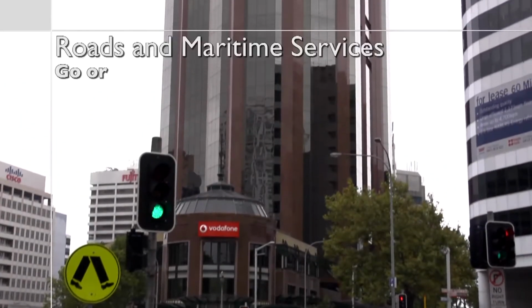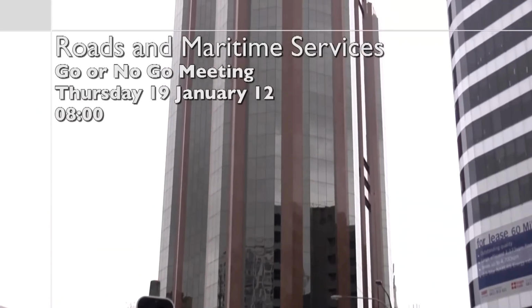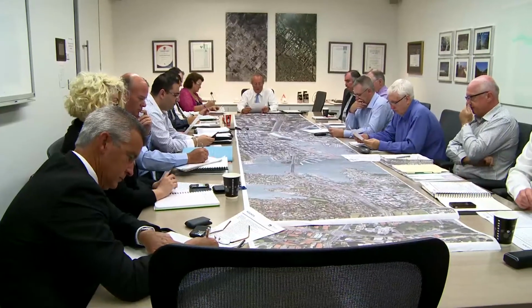We do know that there will be some rain on the weekend. We can strip asphalt in the rain and we can lay asphalt in the rain. The waterproofing, however, is a little bit more complicated and we need dry weather for that. We don't know what next weekend is going to be like. After some consideration, we've decided we're going to go ahead. If there's the slightest risk to any of our workers, we will shut things down.